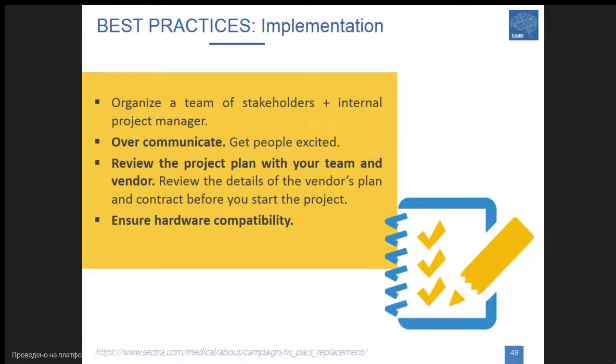For the next step, for implementation, what is the best practice? First one, the key is organizing a team of stakeholders and an internal project manager, so the one who's running the project. The recommendation is to over-communicate, so talk, meet a lot in order to look forward and plan for all possible faults, and to be sure that everybody understands the scope of the project.